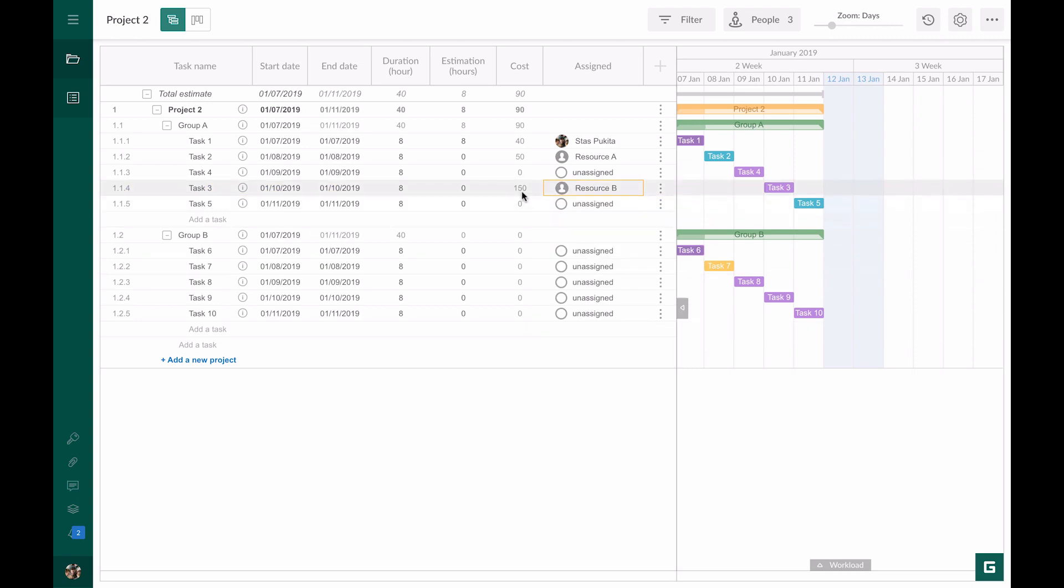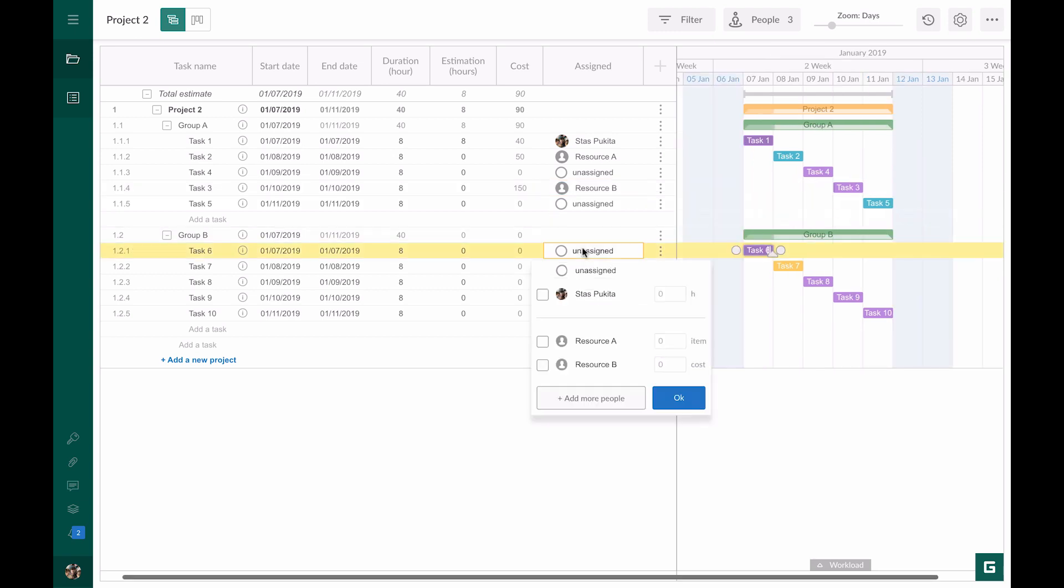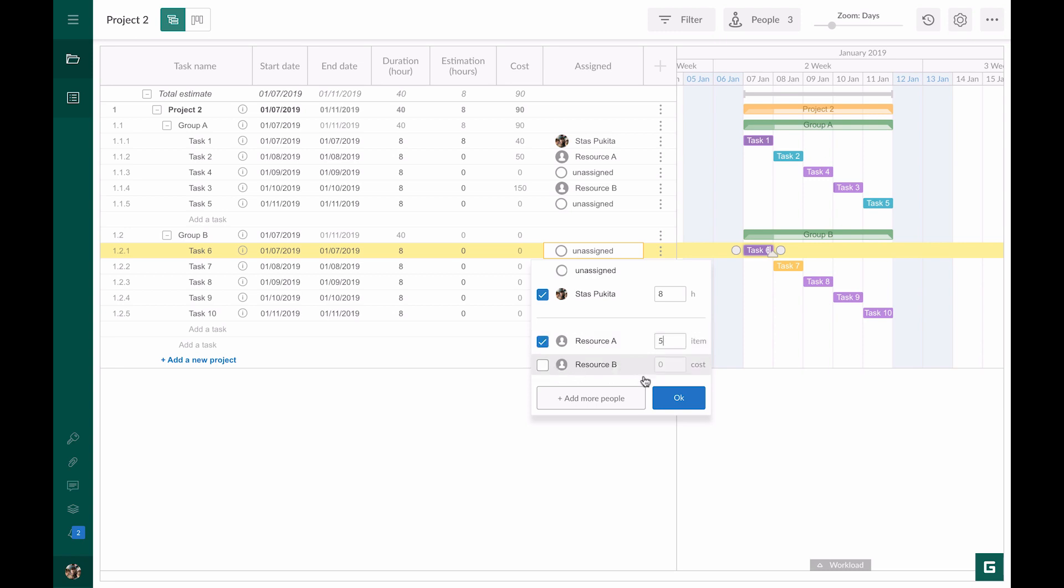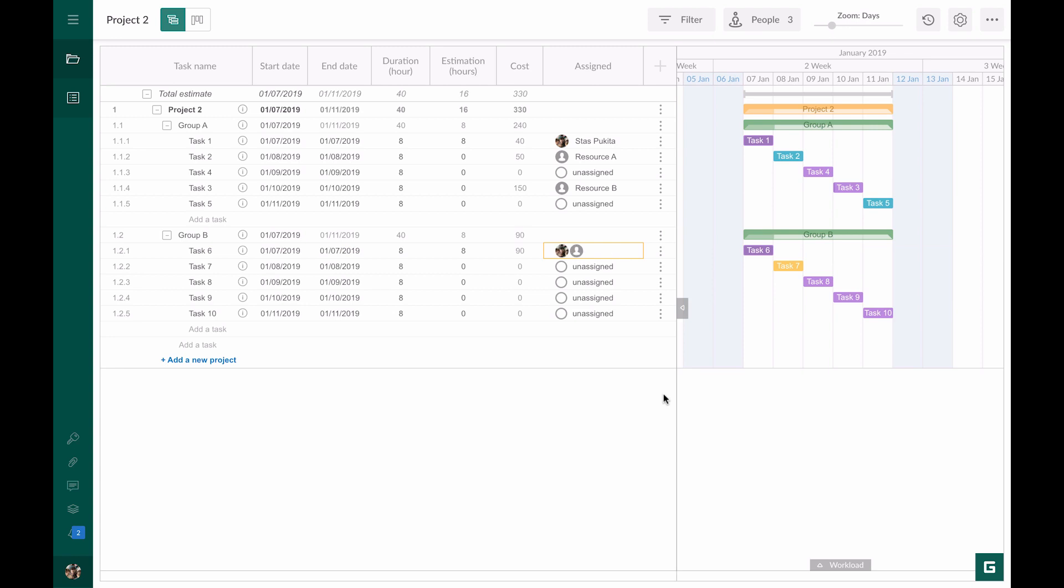Note that you can assign a task to more than one resource with different calculation values. For example, I assign Task 6 to the team member and Resource A. The team member is supposed to work eight hours and use five items of Resource A. In the cost column, we see 90. This is the result of the multiplication of eight working hours by $5 and five items by $10.